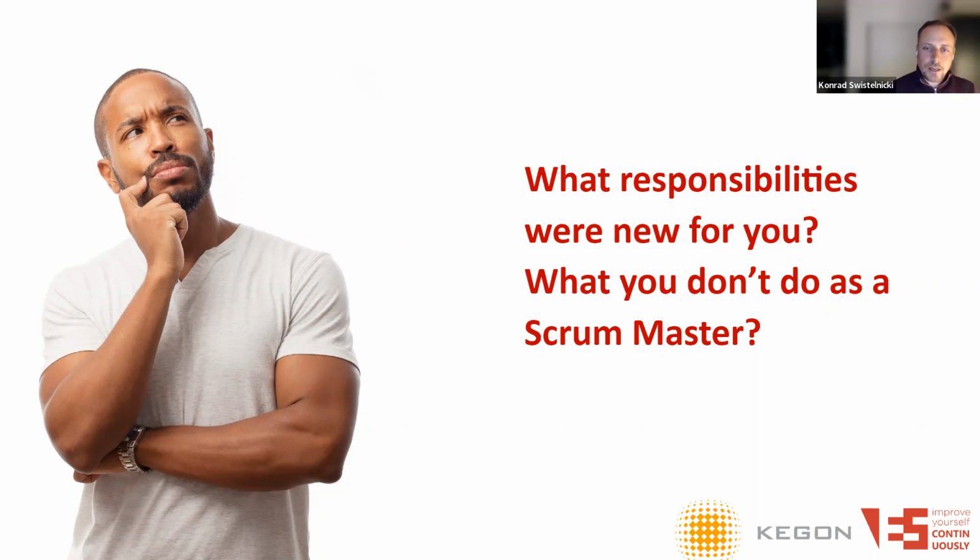Quick comment from my side would be that we need to think about all the activities which SAFe is introducing beyond Scrum. If you imagine PI planning, especially team breakouts, when the teams are working to identify the impediments, they estimate, break down the stories, and they might split them, they would have pretty close collaboration and be busy with product owners. It might turn out that they need some guidelines or some answers from product management. Then the Scrum Master would probably be the best person to go and reach out to product management and either bring those guys to the team, or at least try to get an answer or a certain guideline from them.